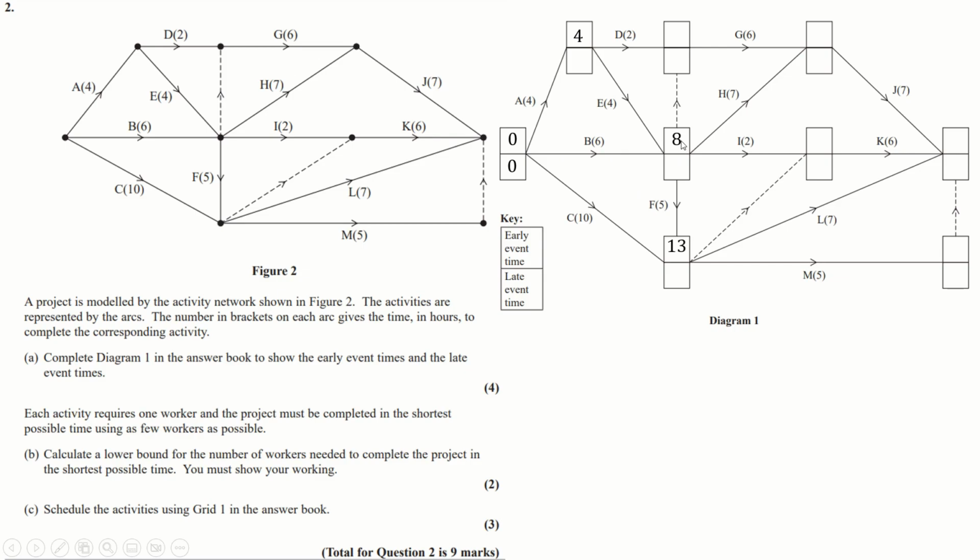But sorry, immediately wrong already, because you could say this is 6, of course, couldn't you? But I just said we need the maximal time. 4 plus 4 is the maximal time, and that gets us to 8. And likewise here, 6 plus 5 is bigger than 10, so we'll use an 11 there. Except we won't, we'll use a 13, because apparently we can do, of course, 4 plus 4 plus 5. So you just have to be much more careful than I'm apparently being in this voiceover to actually look for all of the routes before you do this.